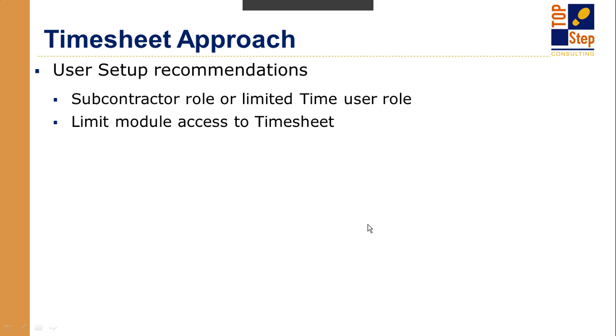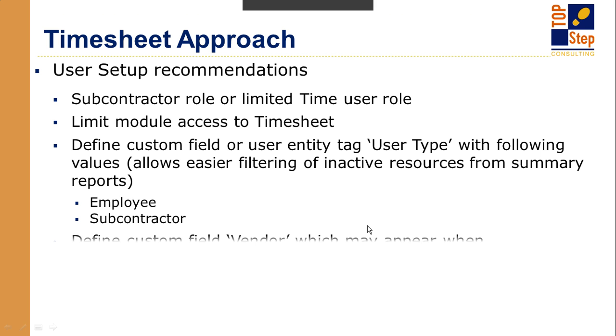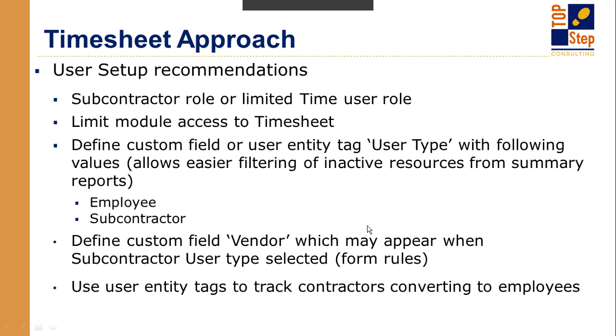A few things to think about if you're going to use this approach for user setup. You're going to want to have a role for subcontractors. That will limit them just to seeing timesheets. There's typically no need, no reason for them to see anything else in your system. But even if you do have other specific needs that you want your subcontractors to be able to see, setting up a separate role just for subcontractors is a good idea. It gives you the opportunity to limit the views of what they should see outside of what your employees will see.